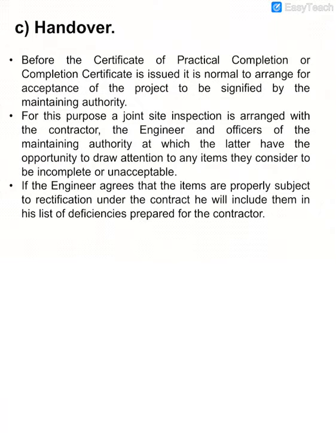So the maintenance authority has to accept the project first. Once they are willing to accept, only then can they issue the certificate of practical completion.